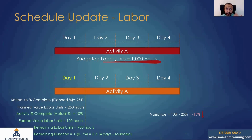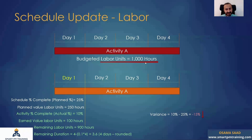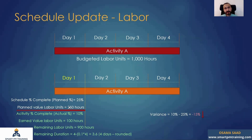Now I'll deal with the same example from a labor units perspective. We talked about why we need both cost and labor units — we need to monitor and report progress data based on both parameters. I'll have labor units overall of 1,000 hours. The planned percentage is 25%, so the planned value labor units are 250 hours — meaning 250 labor hours should have been allocated to that activity.